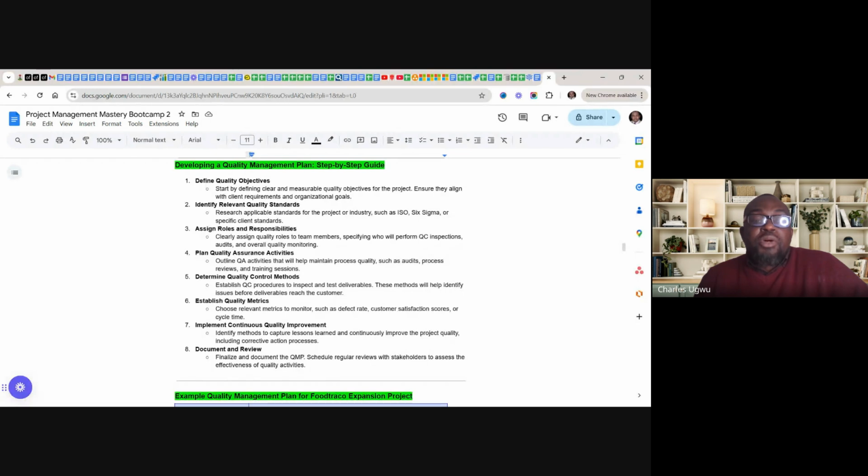This will help us, and it's part of quality control. We test every piece of code in our project, every project, more especially in software development. Every piece of code, we call it a user story, should have acceptance criteria. So we use this acceptance criteria to test every piece of code called a user story, or every feature. That is what we do.